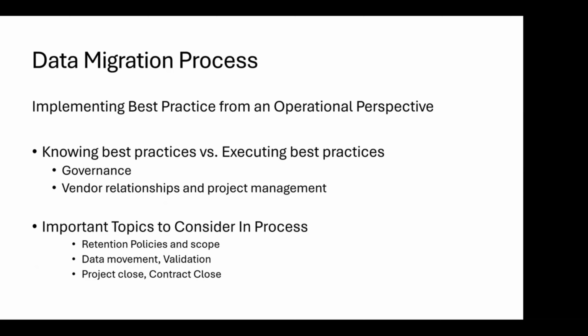And it's very important to make sure that everybody understands the common goals. For us at Maryland, when we did our big PACS consolidation of about 7 or 8 PACS systems consolidating into one, everybody called it the new PACS project. But every slide I presented to leadership, and really any aspect of setting the table for governance, was: yes, it's a new PACS, but we have 3 things to worry about. One is data migration, implementation of the new PACS, and decommissioning of the legacy systems. And the idea there was that they were all tied to each other. Just presenting that over and over gave governance and the group pretty good confidence.